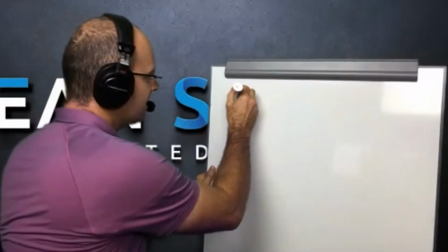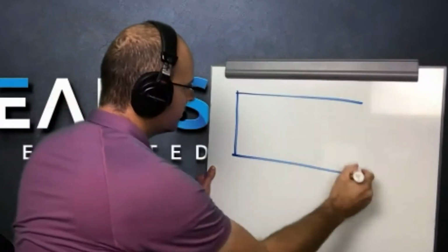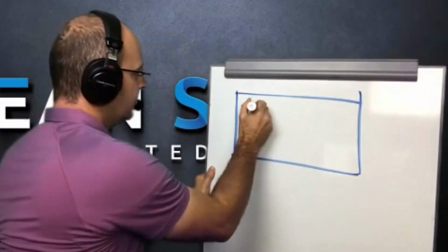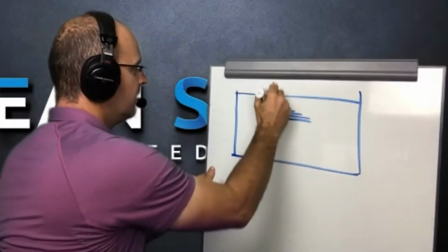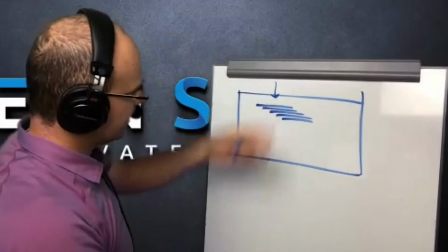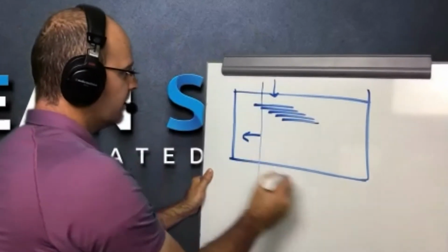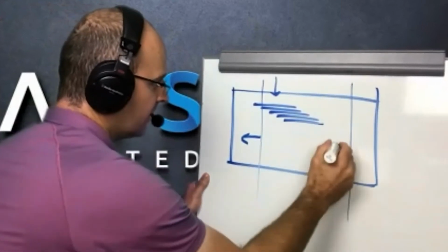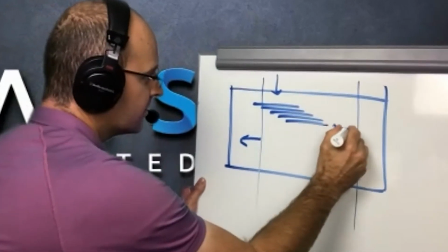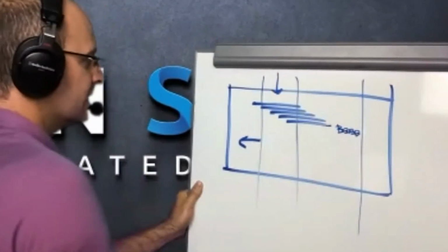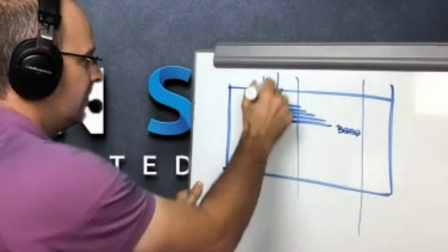So when you have a tact plan, and I'm talking on a norm level, so that means that you might have your activities, but everything on the top is a day-by-day format. You have a schedule now where you can see where you are, where you've been, where the end date is over here, how many buffers we have, but there's also something more important. You can see the next 12 weeks or 6 weeks, and you can see the next week.